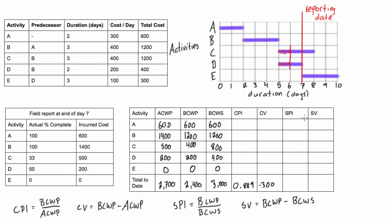Neither CPI nor CV says anything about whether the project is ahead or behind schedule — that's what SPI and SV are for. Schedule performance index (SPI) equals BCWP divided by BCWS: 2,400 divided by 3,000 gives 0.8. An SPI less than 1 means the project is behind schedule. Schedule variance (SV) equals BCWP minus BCWS: 2,400 minus 3,000 gives negative $600.